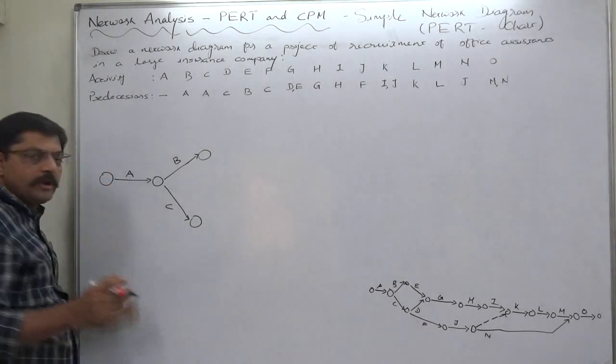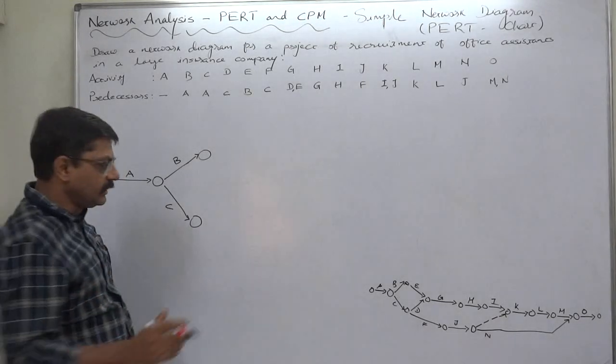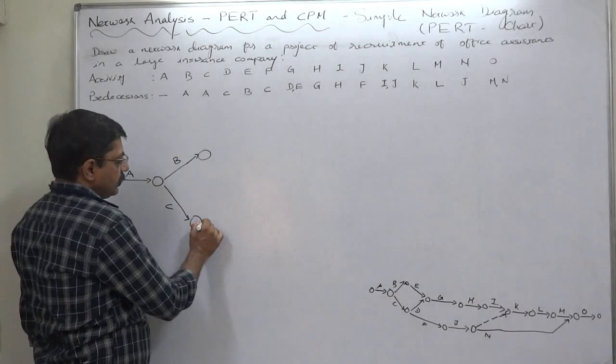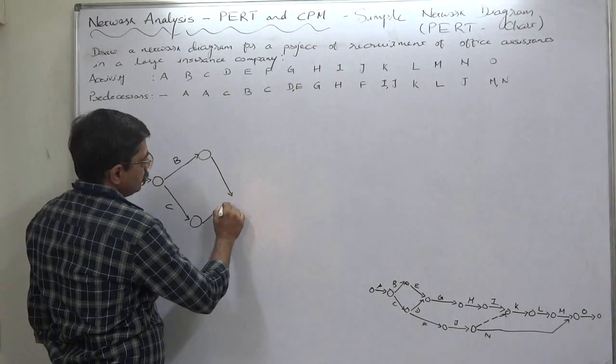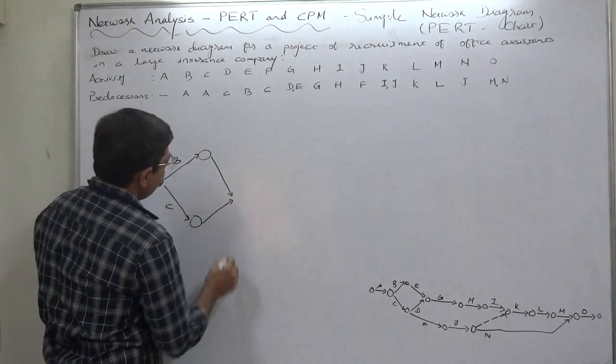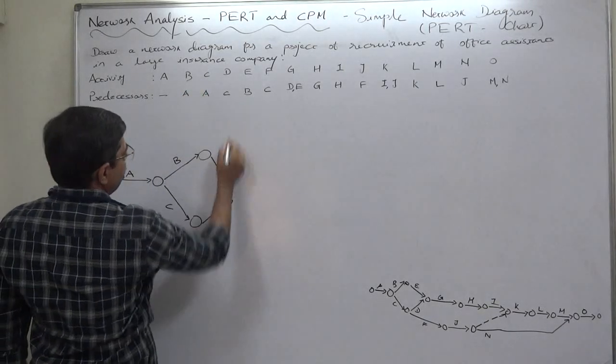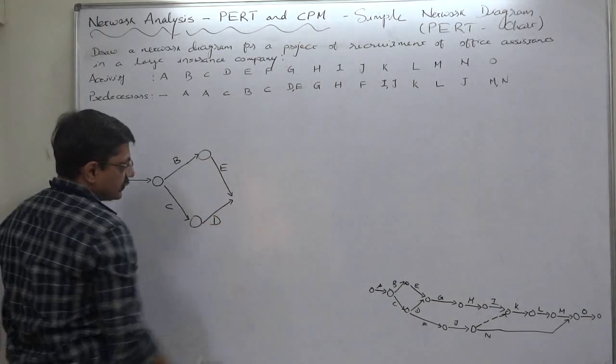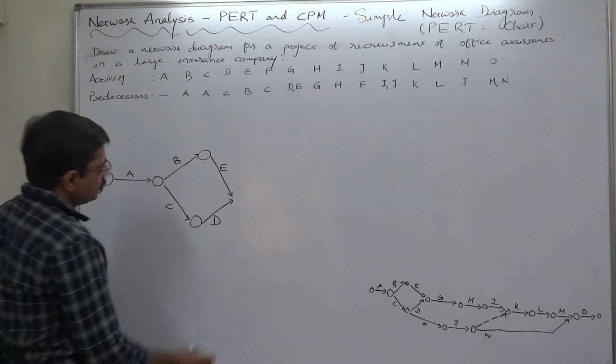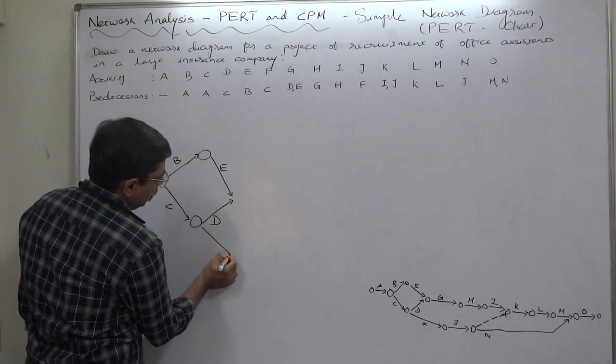But again following the rule of vertical order, it's easier to go forward. From B, E starts, and from C, D starts. From C also F starts.